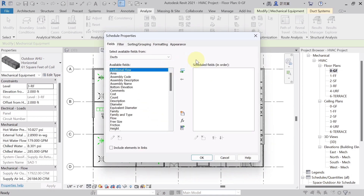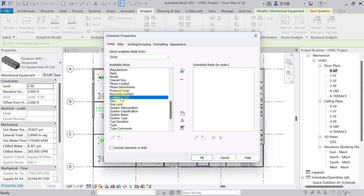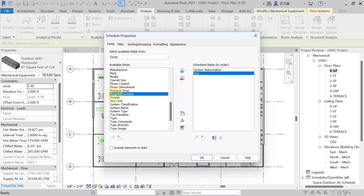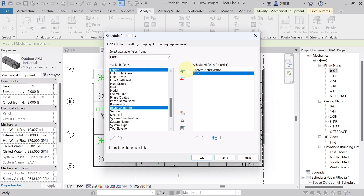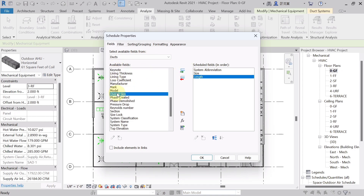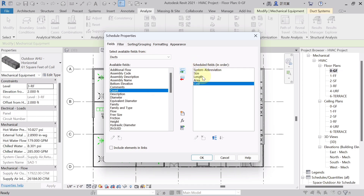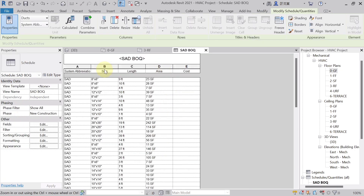Now choose what you want to see in the schedule. First, add System Abbreviation to know if it is supply or return air duct — hit Edit. Then add Size, then Length from the available fields, then Area, and finally Cost. These are the parameters I want in my schedule. Hit OK.